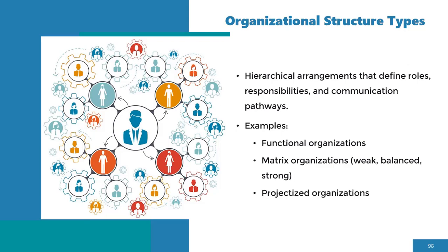If the managers or the leaders within the organization have more influence over the project than the project manager, that is actually a weak matrix structure. Are you getting it now?